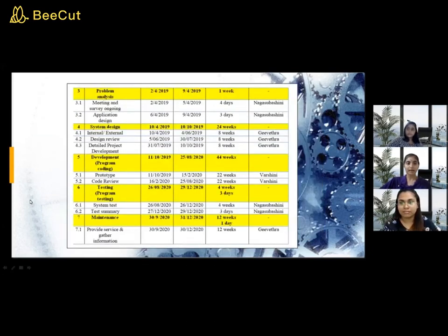Task 3 is problem analysis. Start time is 2nd April 2019 and the finish time is 9th April 2019. It takes exactly 1 week. Task 4 is system design. Start time is 10th April 2019 and the finish time is 10th October 2019. It takes exactly 24 weeks. Task 5 is development, which is program coding. Start time is 11th October 2019 and finish time is 25th August 2020. It takes exactly 44 weeks.